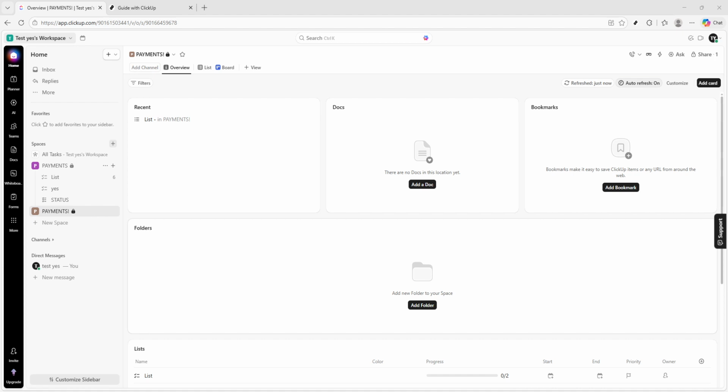Next, turn on Sprints. Still in the Columns menu, find Sprints and click it. This adds the sprint field to your list, so every task displays the sprint it belongs to. It's especially helpful if your team plans in iterations, because you can quickly scan what's scoped for the current sprint and what's coming next, without leaving the list. If you don't see sprints as an option, your workspace may need that feature enabled or the sprint field added to your templates.